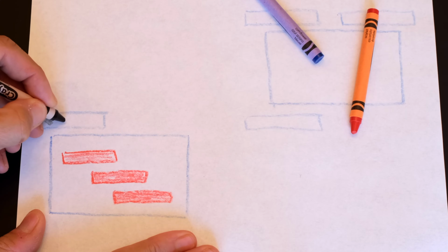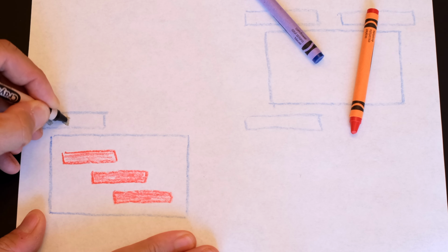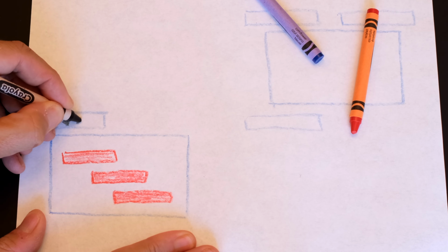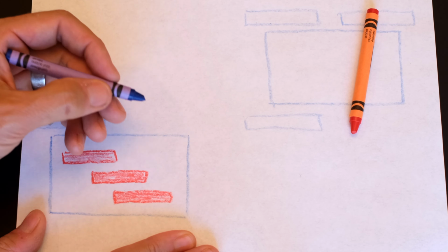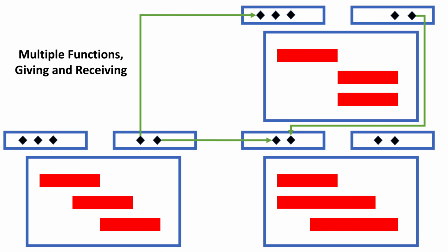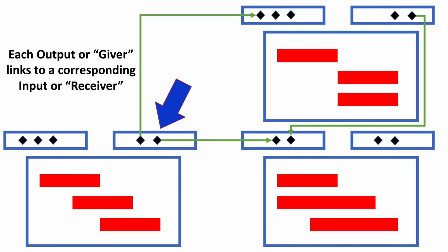What I learned to do, and I just copied this approach from more experienced planners, was this. When I had a link into one function's schedule from an outside function, I linked it to a milestone area above an engineer's work called inputs, and then also outputs. You could call this givers and receivers, and many people do.